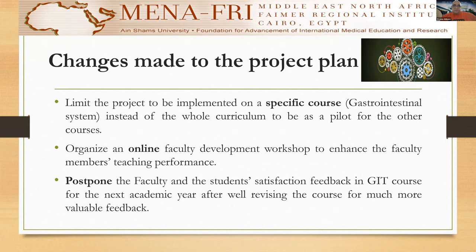The changes made to the project are: I limited the project to be implemented on one specific course — the gastrointestinal system — instead of the whole curriculum, to act as a pilot for other courses later. I organized an online, not on-site, faculty development workshop due to the COVID-19 pandemic to enhance faculty members' teaching performance. I also postponed the faculty and student satisfaction feedback for the next academic year after thoroughly revising the course, for more valuable feedback.